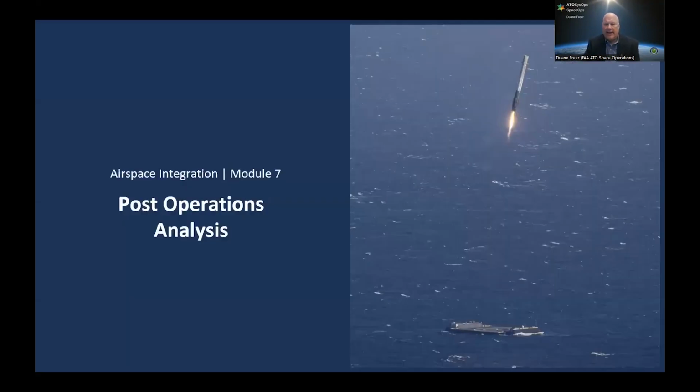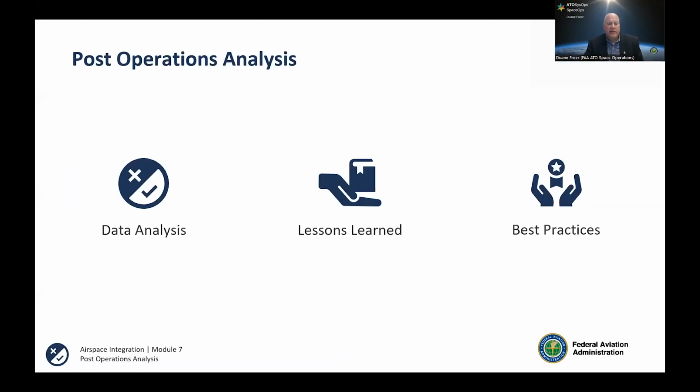And then the post-ops analysis is one of the really key events that we focus on, the lessons learned, and how we learn from past missions, both successes and failures. So it's a 3-step process. We do quite a bit of data analysis. We do a replay where we actually monitor the traffic and the vehicle, and we produce a visual replay of that event, which is very critical in learning. A picture tells 1,000 words, and those replays are really important for our learned success.